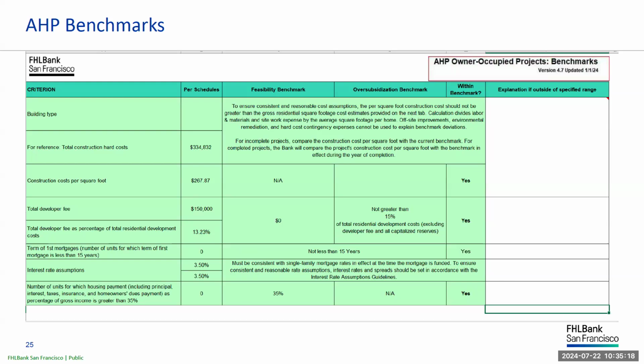For example, if there is an overage in the construction cost per square foot, we will need a quantifiable explanation of costs that are causing the deviation from the RS means in your area. We need to know the exact breakdown of overages from each development cost line item from the uses of funds worksheet with supporting backup documentation.